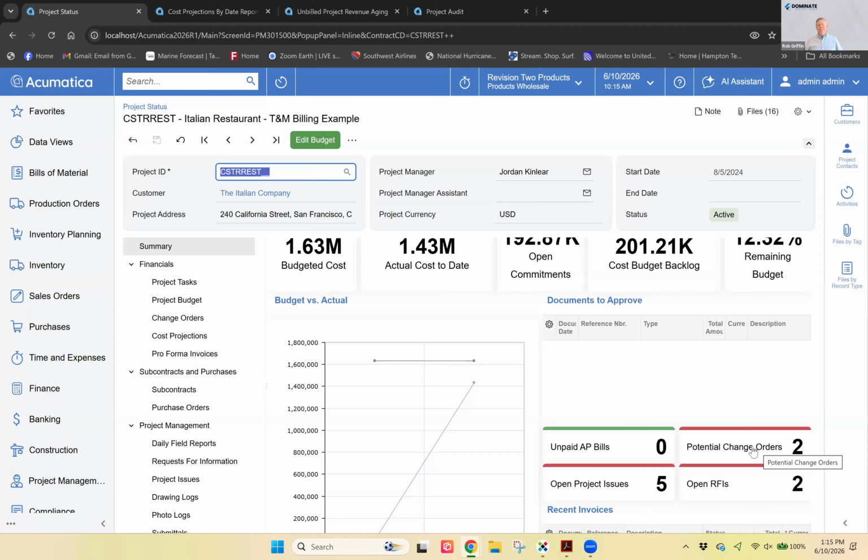I'm glad you mentioned that, because revenue is often left on the table with change orders that are not executed. Yep. And it's not because we don't want more revenue. The PM is not thinking that way. It gets lost in the minutia with all the manual processes because the system's not tracking that for them. Especially if they're not on Acumatica, of course. But what I mean is if they're on a legacy product or QuickBooks, their tracking is Excel. If you're managing 3 or 4 large projects, that just gets lost.